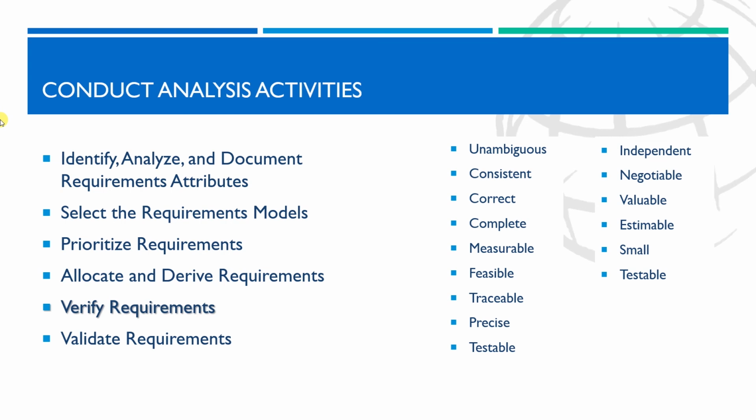It is essential to define the criteria that will be used in prioritization, and this is typically accomplished during requirements management planning. Common types of criteria include value, risk level, complexity, cost, and regulatory constraints.